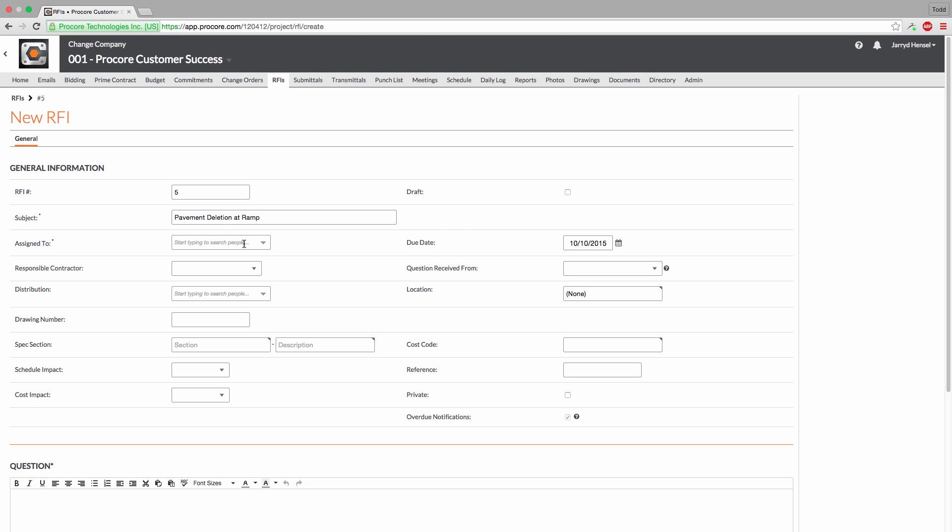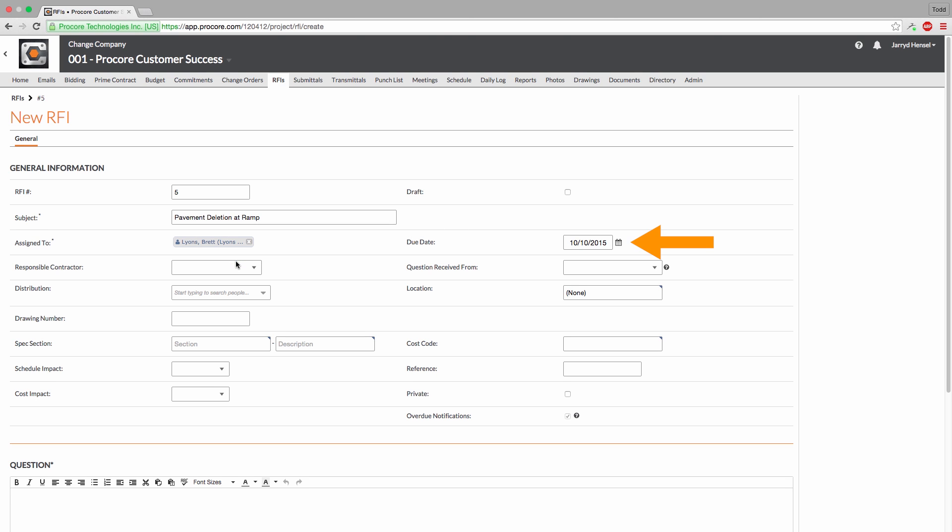Next, let's assign the RFI. You can also set a due date, but Procore will automatically designate one regardless. If the RFI assignee does not reply to the RFI by the due date, Procore can automatically send overdue email notifications on your behalf.